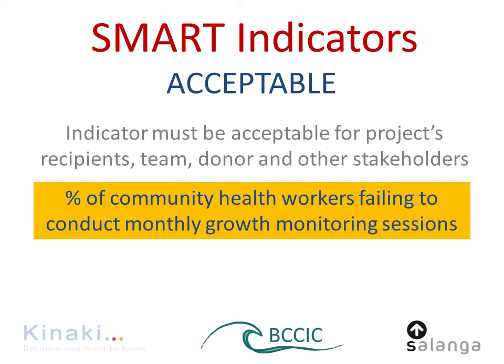So my suggestion would be to measure percentage of community health workers performing monthly growth monitoring sessions. And that actually, just by changing it into the positive statement, we basically measure the same thing, or the reverse thing, but it will be much more acceptable in the community when we present the results.